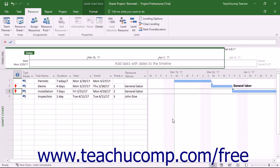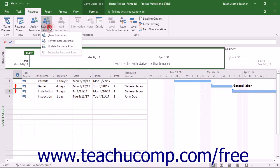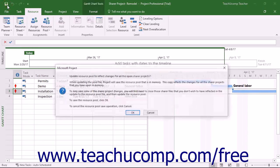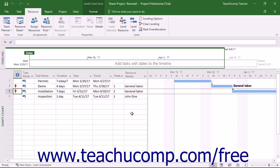When finished editing assignment details, click the Resource Pool drop-down button in the Assignments button group on the Resource tab in the ribbon, and then select the Update Resource Pool command to update the resource pool with the new assignment information from your sharer project file. If you make changes and then click the Save button, Microsoft Project prompts you to update the resource pool with the changes. In the message box that appears, you can click OK to save your changes to the resource pool file.